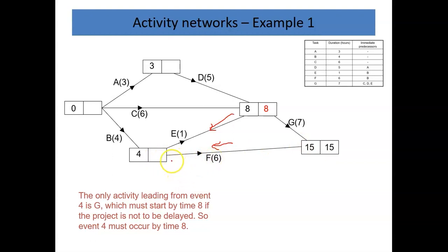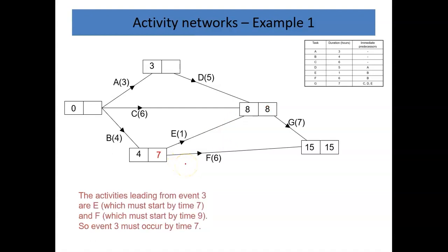Now, the weird thing is, I make this as small as possible. And so for that reason, it's the 7. I think most people would perhaps think 15 take away 6 is 9. You do that, but you don't. You do the smallest one when going backwards. Biggest one when going forwards, if there's more than one. Going backwards, it's the smallest.